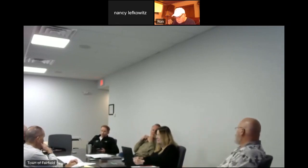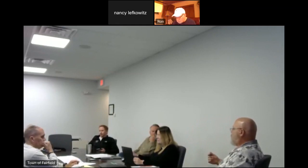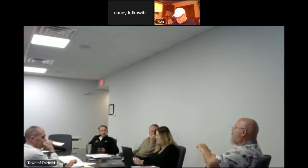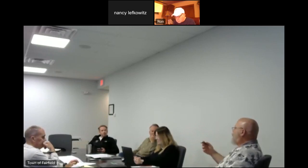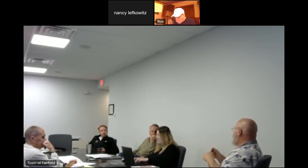So, John, I don't know what the RAS center is, but is that the year-round generator we're using? And what happens if that one goes? We have to get another one. But where do we go? We go to the same place we went this time, and this one took a year. We ordered it last March, it came in December. So what happens when a transformer fails for 3 days? What doesn't get done? That area gets run by the generator. From Friday the 17th until they got that transformer in, we were on generator power in that building.